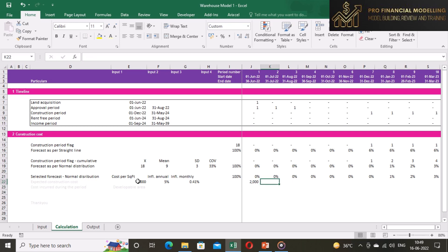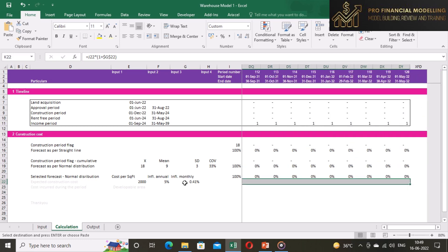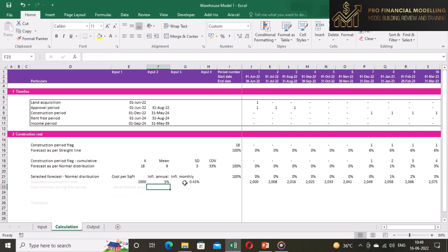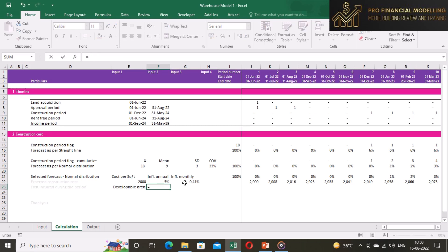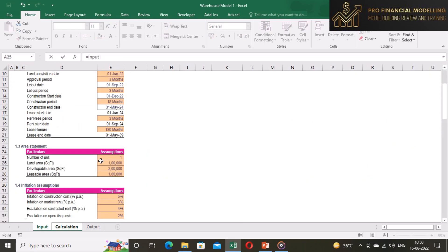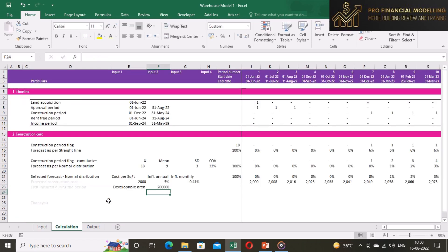Now the construction cost at period one will be from input and it will grow as per inflation from next month onwards. Our forecasted construction cost will be total developable area multiplied by development forecast multiplied by construction cost. Freeze the inputs and copy the formula across row.